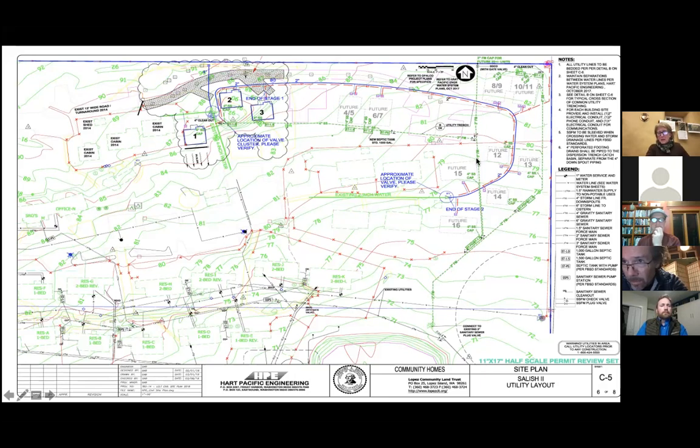And you have to think ahead of time, like this is a neighboring property, and all of the sewer district force mains come through our property. So we don't want to be in a situation where somebody comes in later and says, well, we have to get through your property, and they dig everything up. So you'll probably, as we did, since the piping is fairly cheap, go ahead and put that in ahead of time, right?